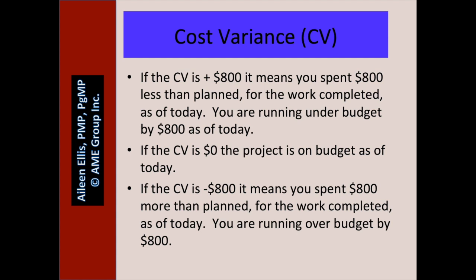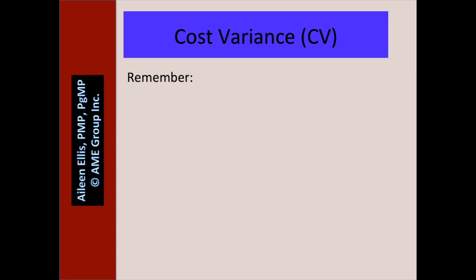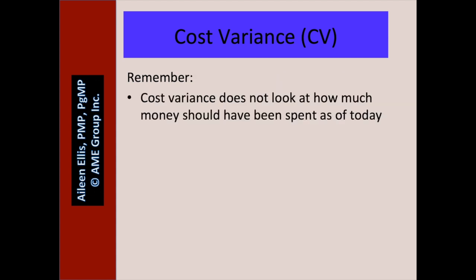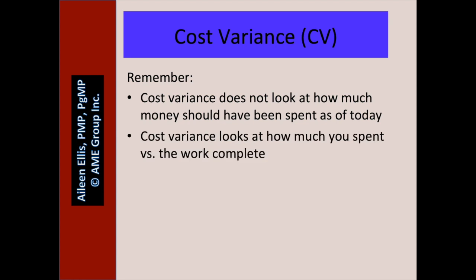Pause the video if you need to review this again. Remember, cost variance does not look at how much money should have been spent as of today. Cost variance is not about schedule. Cost variance looks at how much you spent versus the work complete.